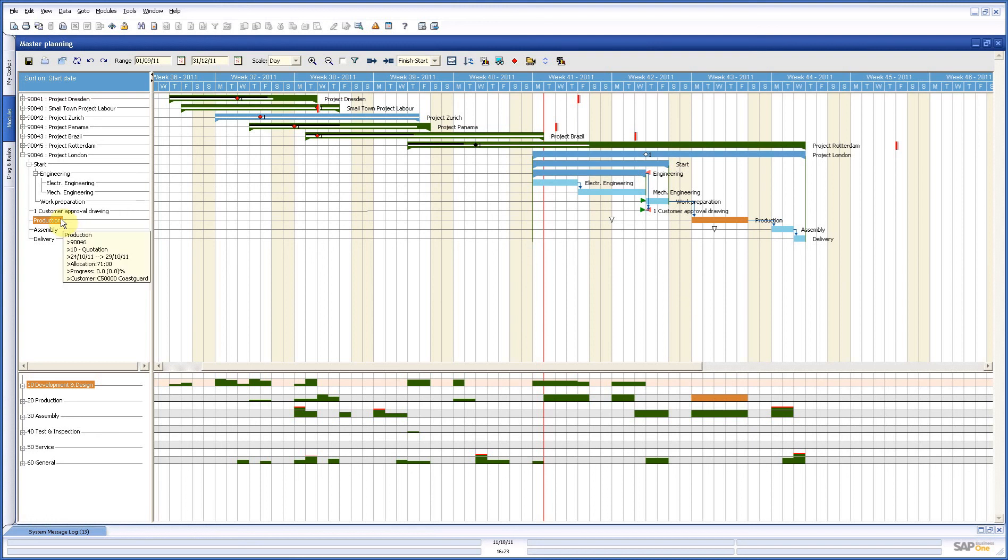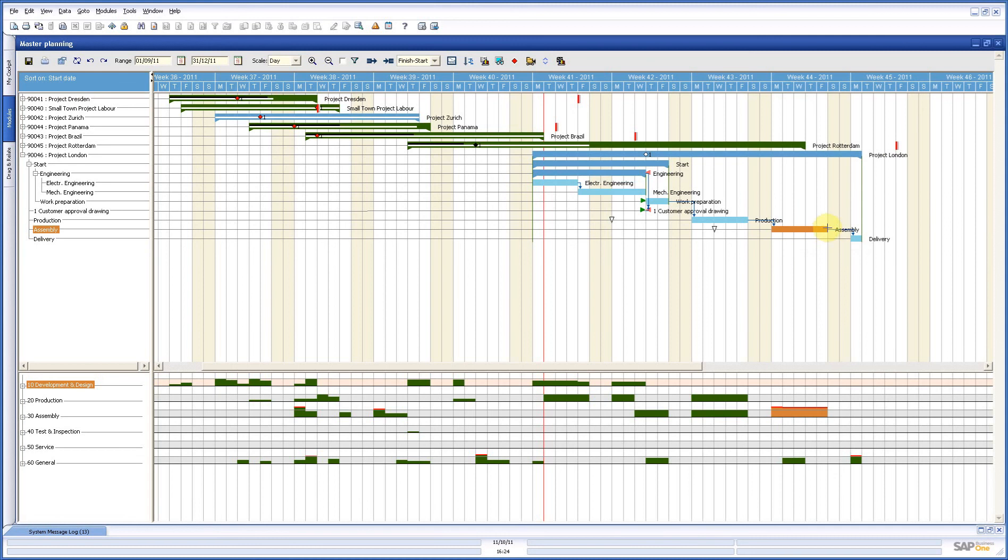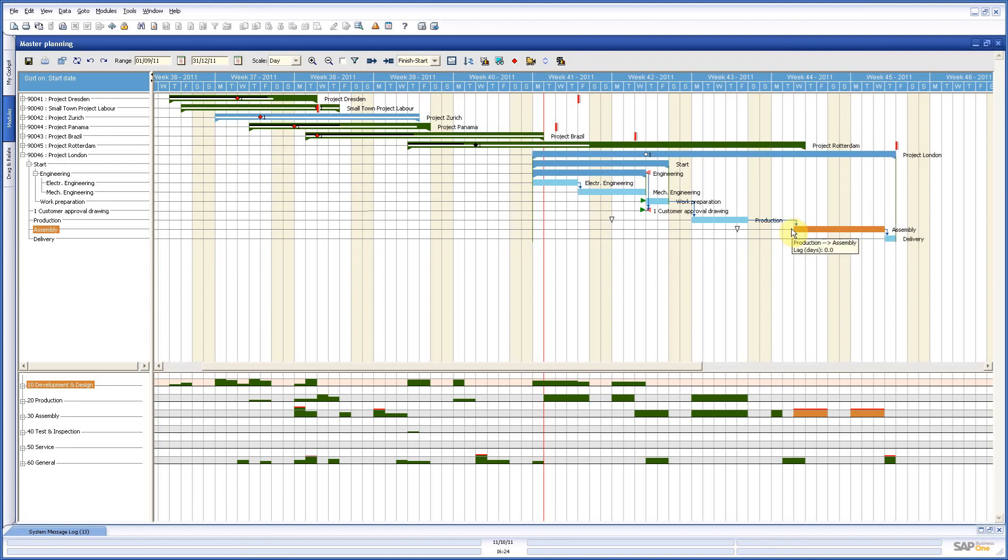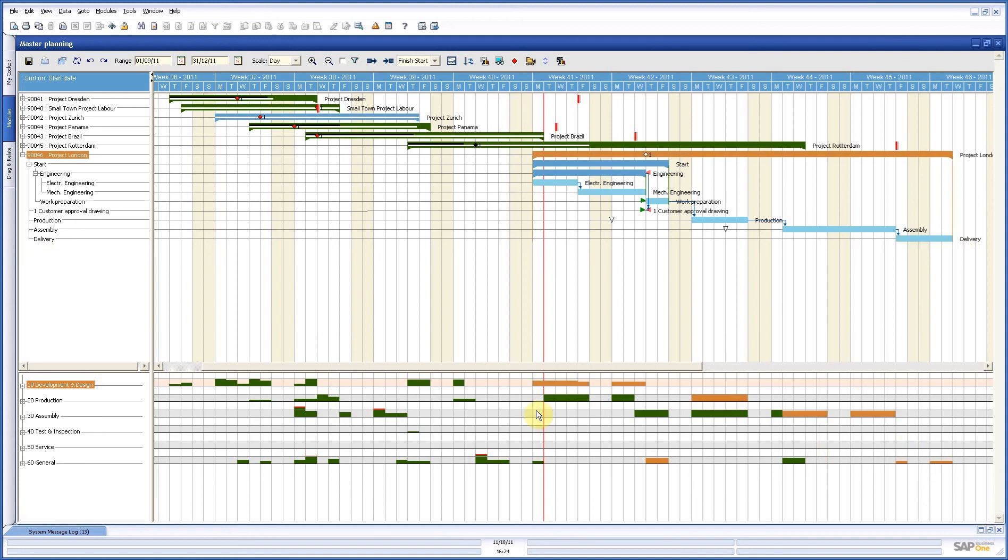Now, we see here a little problem with assembly as well, so we make that a little bit longer and we need even more than a week. Now, it fits, but we see that there is still something left from another project. And here with my delivery, I have to do the same, just make it a little longer. And if I have a look now, I see here that no red lines on this project, so this is planned very well for my resource or capacity needs.